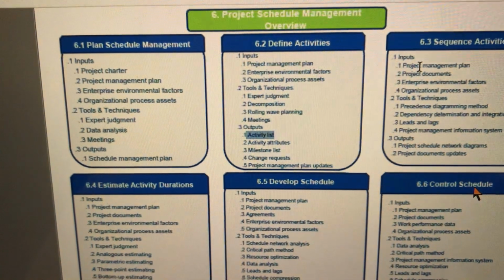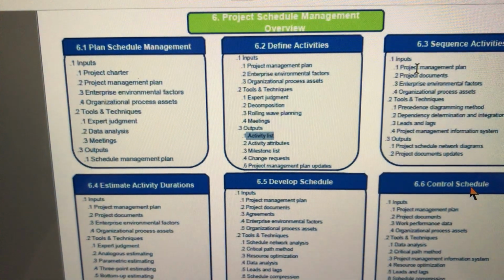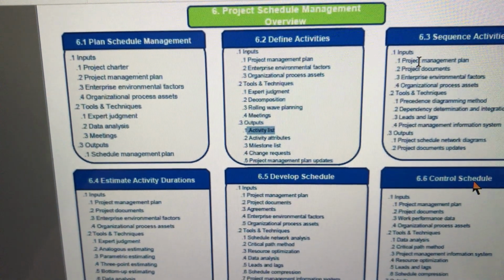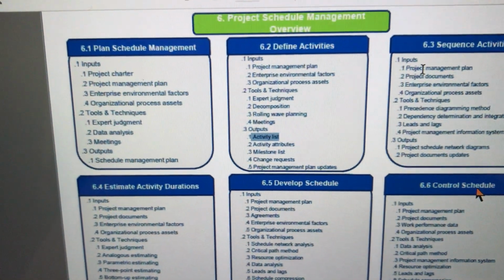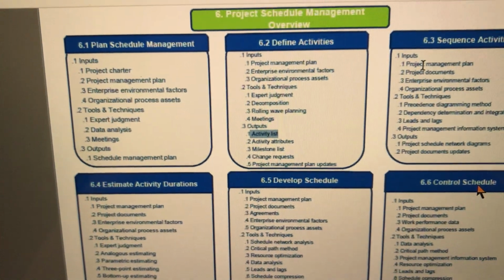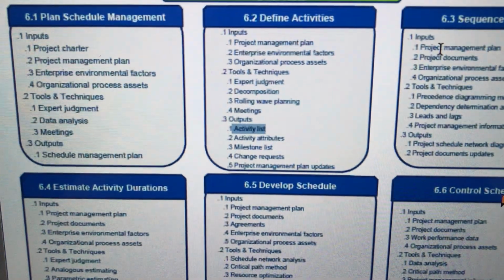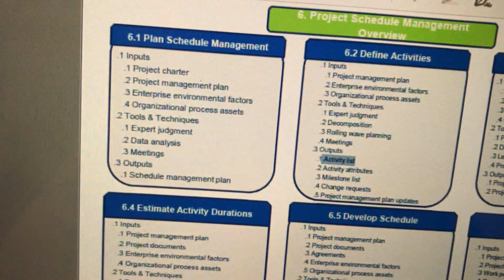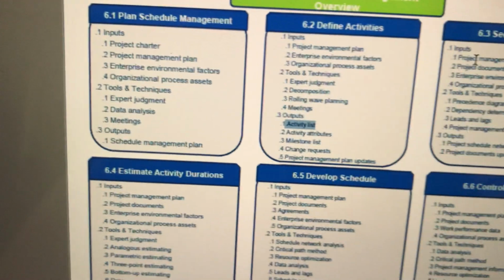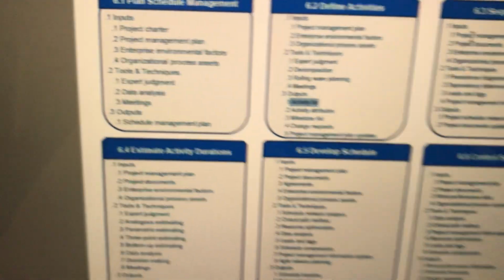The project duration becomes 4 days. But always the project manager's responsibility is to give it in the shortest duration. He will try to see whether we can give it in shorter duration. So what will he do? He will look at the nature of the activities. Can I do two activities in parallel, simultaneously? In this painting example, you can. You can send one of your staff to buy the paint, one of the staff to scrape the wall. So on day 1, you would have completed 2 activities. Day 2, you will put the primer. Day 3, you will put the final coat. So your duration, instead of 4 days, now has become 3 days.